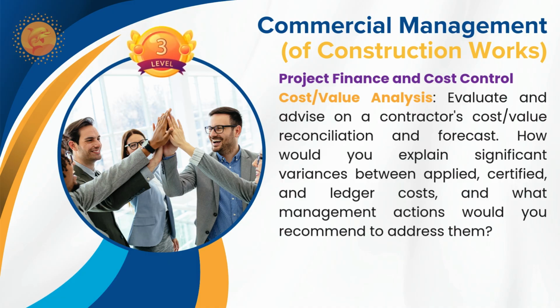The budget is the pure fund or finance that is available for the project team and operations team. They are going to control the budget, the cost of the project, and compare them during the execution. If something deviates from the budget, you have to seek how you are going to manage the risk. Are there any funds available in your contingency? Then of course, yes, you will be able to manage those risks by getting approval from your management for utilizing your contingency allowances. Otherwise, it is going to be difficult.